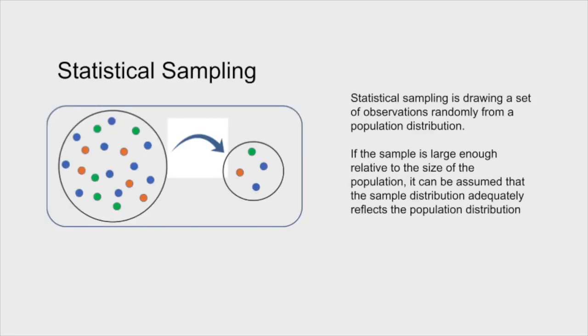Next, we talk about statistical sampling. This is a common one, and once you get your head around it, it's a pretty simple concept. Effectively, it's very difficult to count everyone, or to count everything, or to analyze everything. So what do we do in order to solve the problem of we need to maintain quality, but we can't afford to look at every single item? So what we do is something called statistical sampling. Statistical sampling means we pull out a random sample of the total population of items that we're producing or the total project, and we say that that sample will be big enough to represent the entire population or the entire production. So we pull out randomly a certain number.